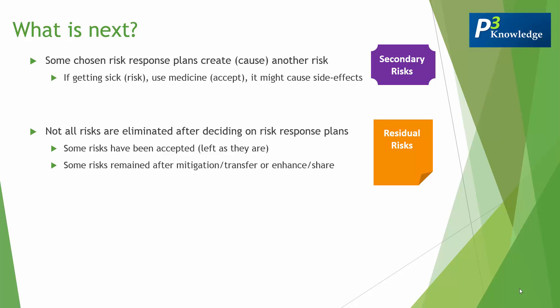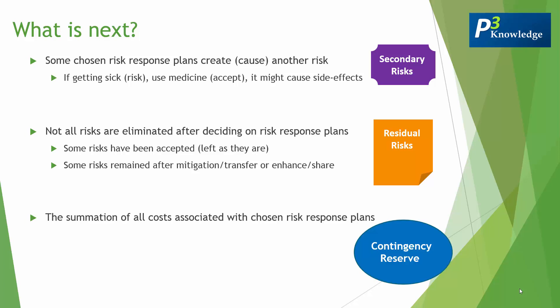Why is it important to look at residual risks? Because whatever we invest in risk response strategies, we need to see a meaningful difference in reducing negative risks and enhancing positive risks in a way that is a good investment. The contingency reserve is the summation of all costs associated with the chosen risk response plans. Looking at how much you're paying to handle risks versus how much of the risk remains is called reserve analysis, which you can do throughout the project. If the remaining risk is less than how much you're paying, that means you are making a good investment.